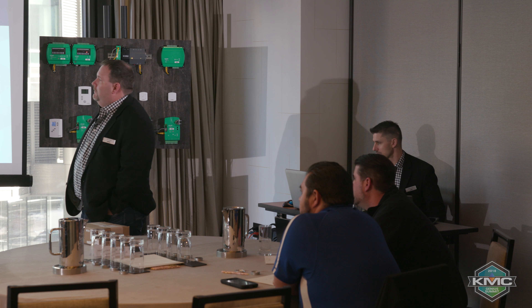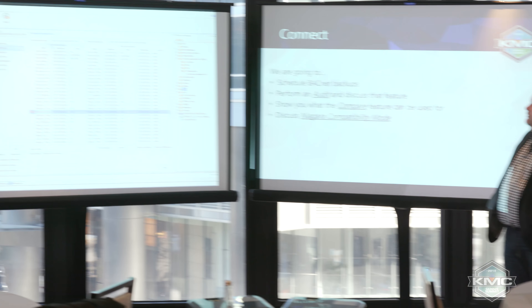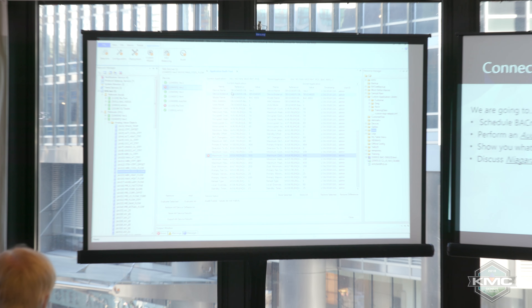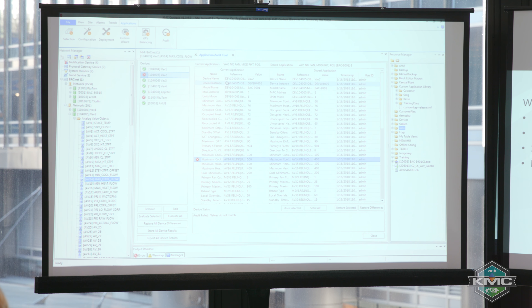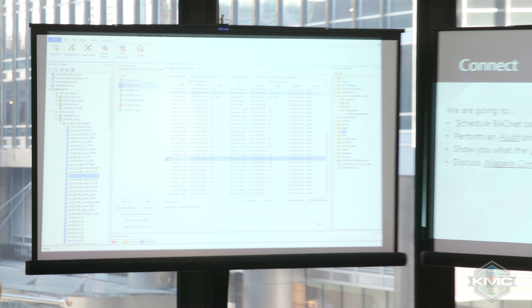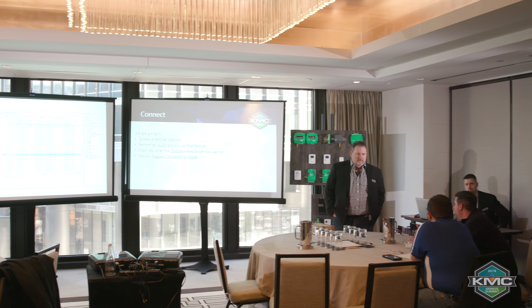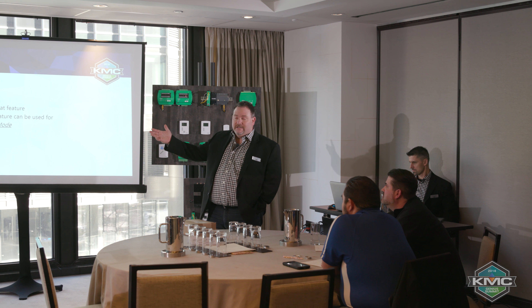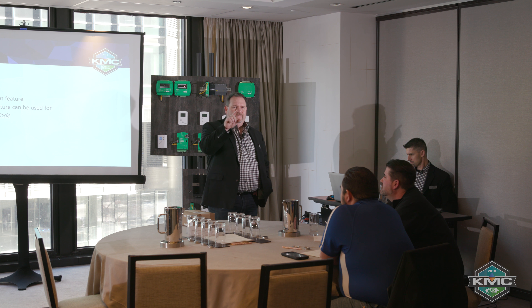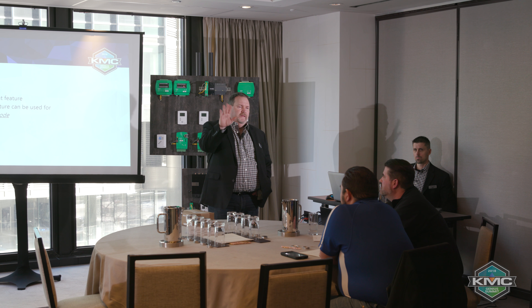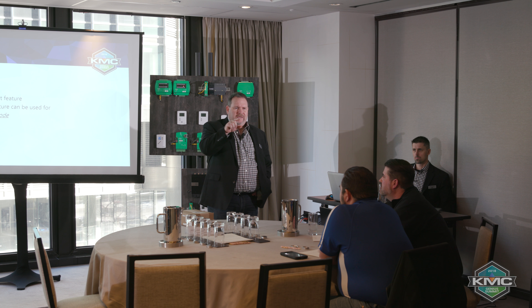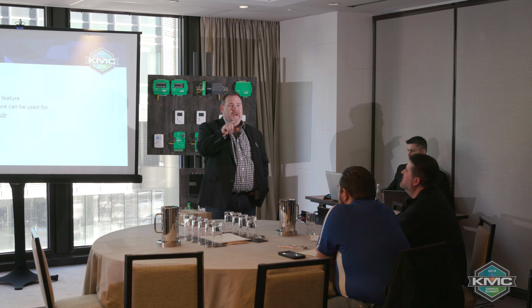On this side it shows what's stored over here, and then this is what's currently in the controller. So technically, if you did your commissioning but then you've got a couple tweaks to do a week or two later, you run a new audit and just save it - you're up one revision, two revisions. And when you come back six months later you can go through and say, that cooling setpoint is only one temperature off, leave that one. But the K factor on this one is way off, the CFM flow is way off - you want to put all that back the way it was.